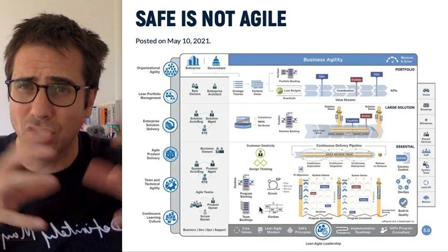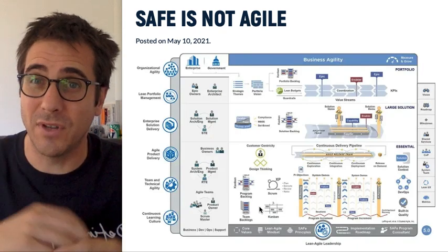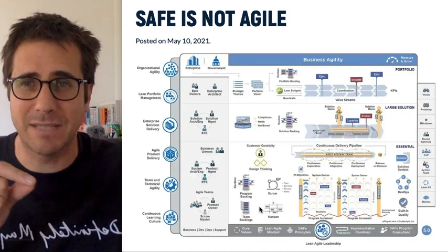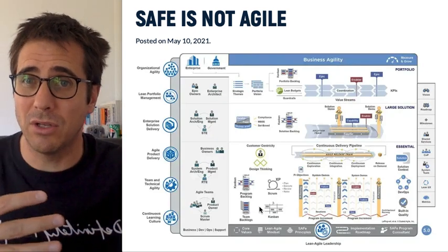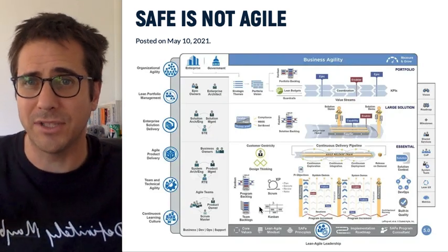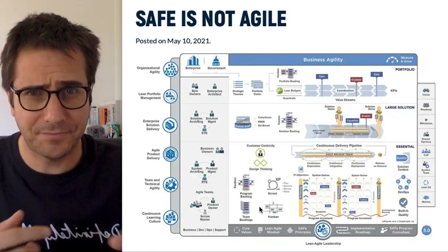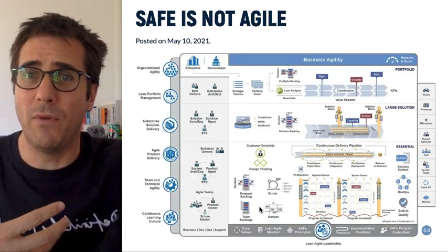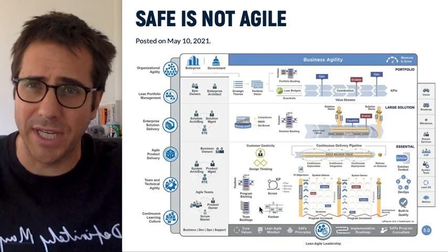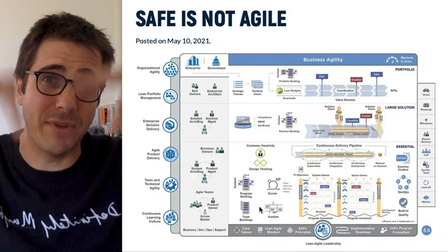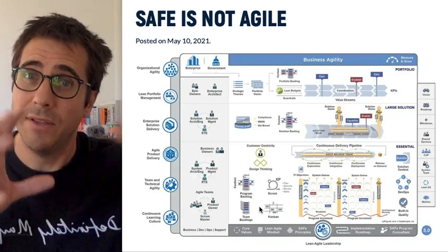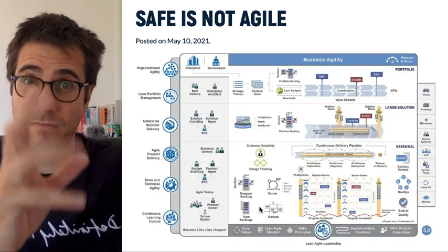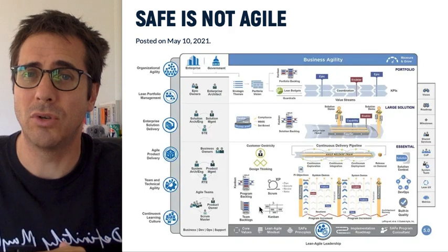And each one has its own sort of types. If it's a personal thing, you've got tasks, and those tasks in the task backlog probably go through a very simple workflow. If it's a program backlog, you might have a certain workflow for that, and they would be features in there. And in more of a portfolio backlog, you're going to have the epics and the objectives of a project. And you might even have a backlog on top of everything that says these are the initiatives that we want to look after. If you've got more than one initiative, this would all normally fit. This is the fitting of one big organisation.